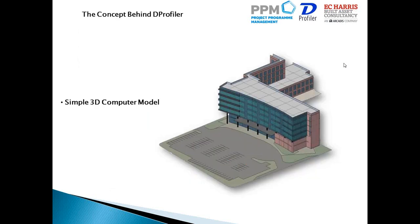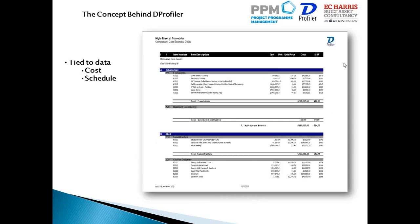A quick view of the concept behind the profiler: it's a simple 3D computer model where you define the external geometry and some site features such as car parking and landscape area. These are intuitively linked to the quantities calculated in your cost estimates. You can actually see what parts and components of the model are associated with what cost. You tie the data to the cost, linking the 3D model to the actual costing information, and also apply it in 4D sequencing and scheduling.